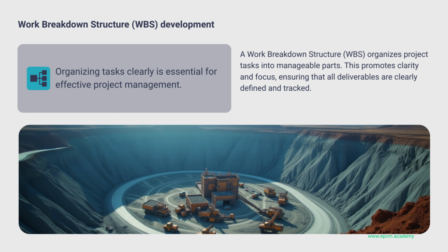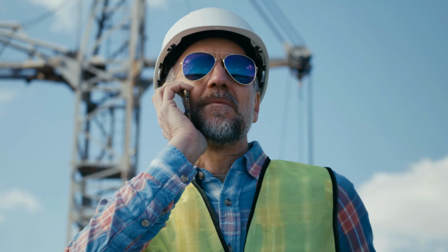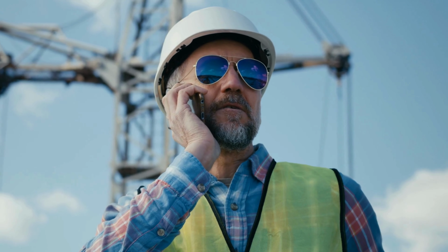Absolutely. And in this case, the schedule needs to factor in all sorts of variables: lead times for procuring materials and equipment, logistics of mobilizing the workforce, even things like seasonal weather patterns, which can have a big impact in a remote location. It's like a giant, intricate puzzle where every piece needs to fit perfectly.